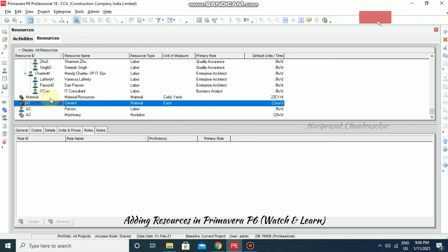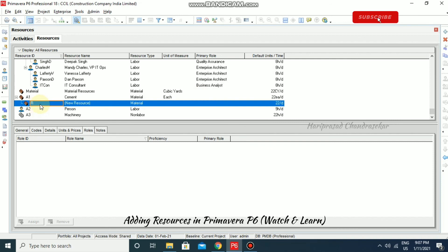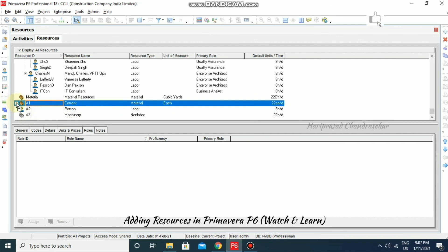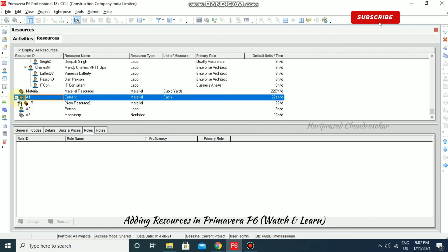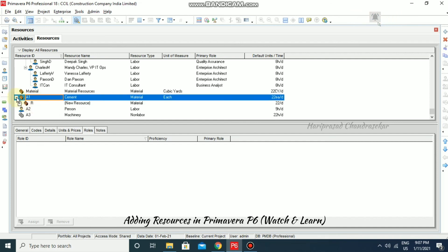You can also create a parent resource — for example, under Cement you can add other materials below it. This hierarchy is similar to the WBS we created before. Like this you can have one set of resources. You can use the minus icon to collapse and display all resources under the selected one.